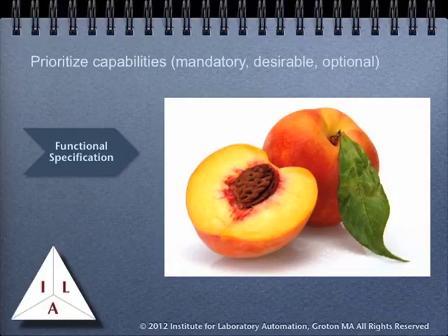The desirable ones are the ones that we start digging our heels in for, and making some serious decisions about what is and what is not important. Depending on the scope of the problems you're looking at, you may have to give up some of these, but in doing so, preserve all of the mandatory functions. These trade-offs can occur early in a project when budget and schedules are being negotiated. So preparing these when the functional spec is first drawn up makes a lot of sense.